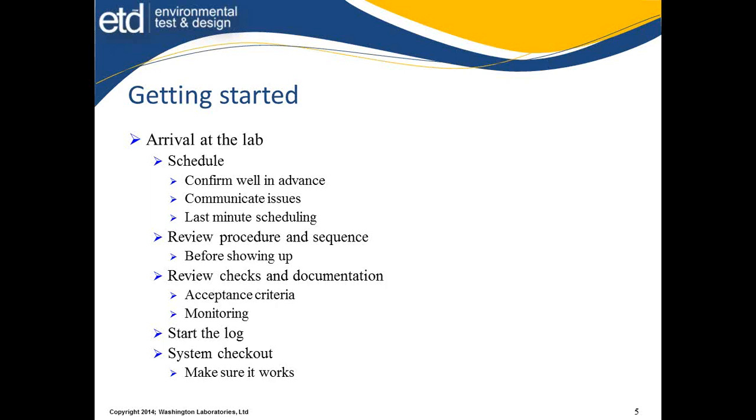I need to do the system checkout, make sure everything is working, that the power is there, that we can configure cables. Can we get to the various things, or do we need to be thinking ahead to say, well, at this point I'm going to have a different cable set to reach the outside world? We might have a few days to let things happen until then. We may be able to start storage tests while we're getting operational configuration issues varied. It's not uncommon to see a test begin and then get interrupted while we wait on something to finalize as far as support goes. But the idea is we need to walk in knowing where it works.